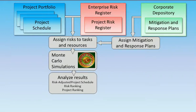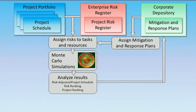The Monte Carlo simulations will help you perform risk ranking and prioritization. You will get clear insight into how each risk will impact project cost and schedule, and allow you to prioritize your risks to ensure you focus on the most critical risks. Another result of Monte Carlo simulations is project risk ranking — you can rank projects in your portfolio based on their risk exposure.